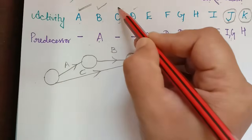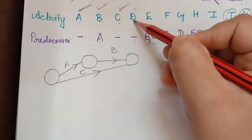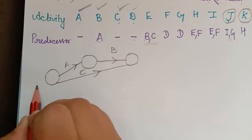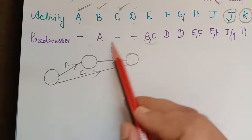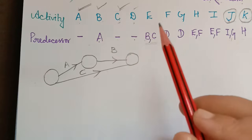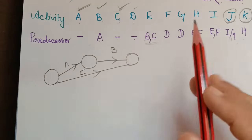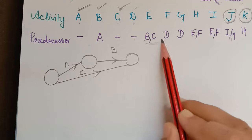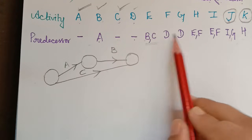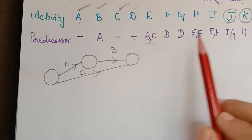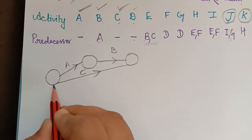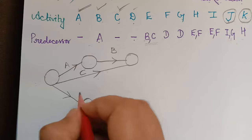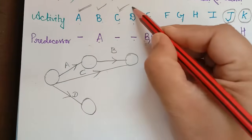Activities A, B, and C are done. Next is activity D, which has no predecessor, so it starts from a new initial node. We check the predecessor list — D has appeared twice but never alongside any already-completed activity, so we draw D as a new activity with its own starting node.